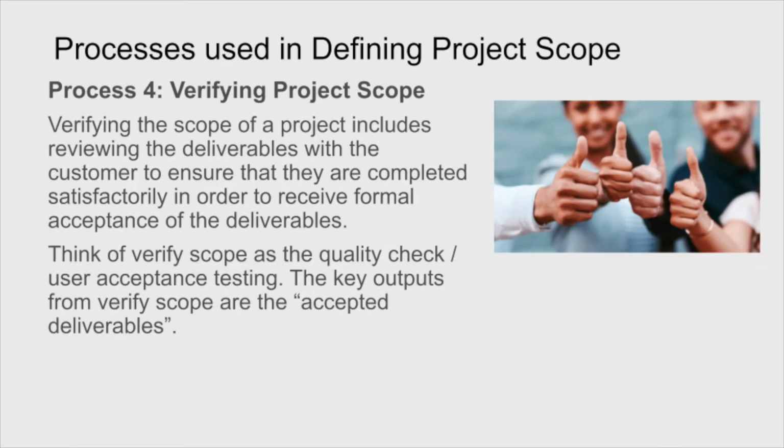The work breakdown structure flows naturally into this fourth step of verifying the project scope. Once we've got the work breakdown structure done, we have a clear indication of what we need to do and the various steps involved. We need to meet with the customer, the client, the organization, the person who needs this project completed. We sit down with them and we explain, here are all the things that need to be done. We seek acceptance at that point.